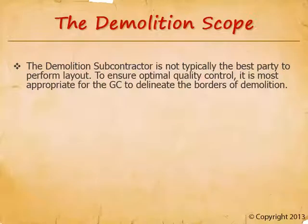The demolition subcontractor is not typically the best party to perform layout. Demolition subs have a lot of great attributes, but quality control and attention to detail are not among them. When a demo sub is told to demolish, say, 50 walls for a TI project, they're going to demolish those walls and then leave jagged gypboard edges. The framing subcontractor will then have to clean up, trim, and patch all of the gypboard that the demolition sub has ripped apart — and that will be considered extra work for the framing sub.